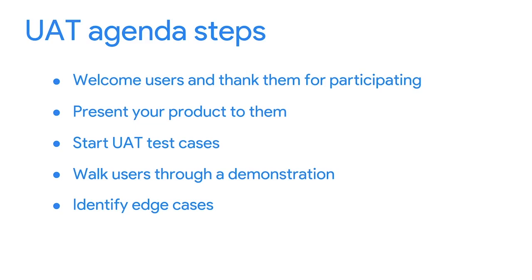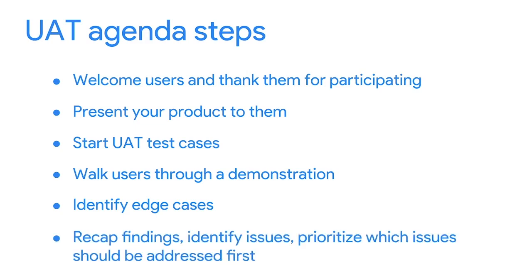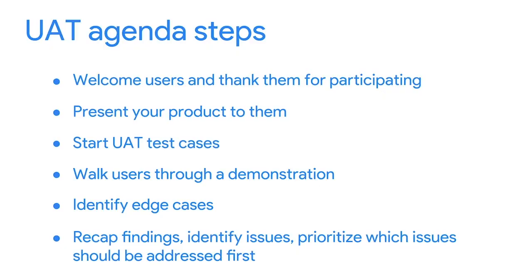During testing, your users will be able to help you identify edge cases — rare outliers that the original requirements didn't account for, dealing with the extreme maximums and minimums of parameters. For example, imagine you created an app that allows for unlimited photo uploads, knowing that users will rarely upload more than a thousand photos in a single session. How will the system deal with someone who actually does upload thousands or millions of photos in a single upload? After identifying edge cases, the last step of the UAT agenda is to recap your findings, identify bugs or issues, and prioritize which issues need to be addressed first. Then you'll be able to close and conclude your user acceptance testing.